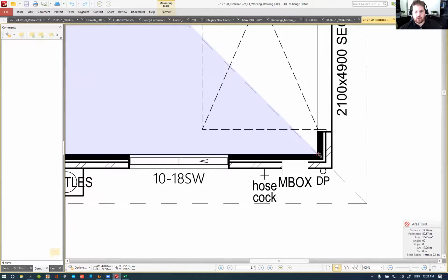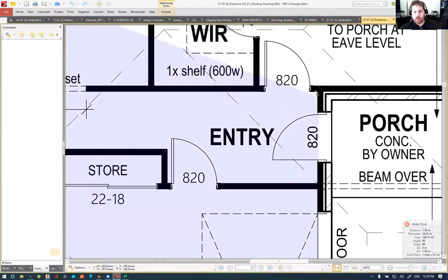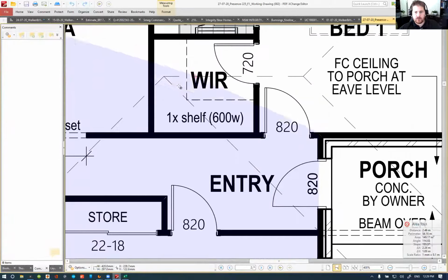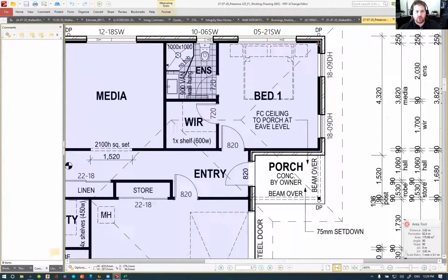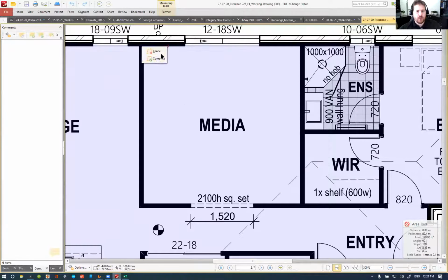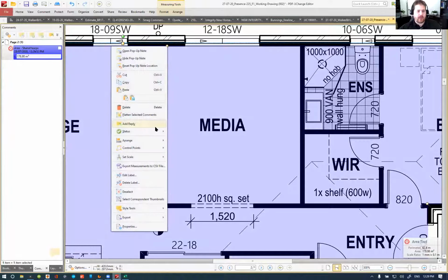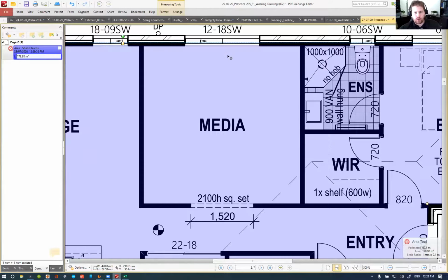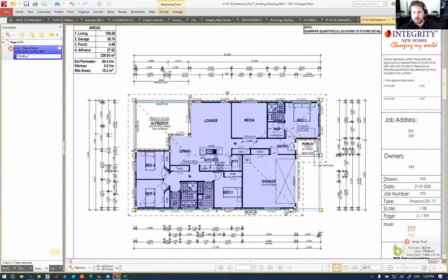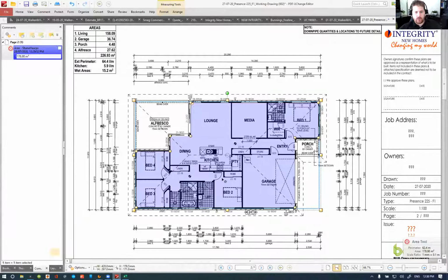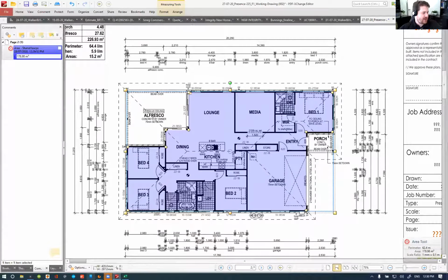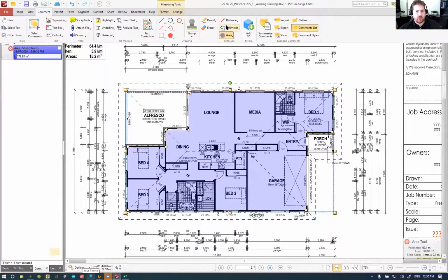The reason we're doing this is many trades only work on the inside face, obviously after the frames go in, plasterers for example, plasterboard supply, etc. We're not ordering it for the cavity, so we really want to know what this perimeter and what this area is. So 62.4. Internal wall frames is 82.89 according to it.